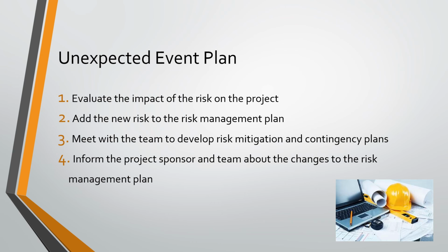In the case of an unexpected event, we would evaluate the impact of the risk on the project. We would add the new risk to the risk management plan. We would meet with the team to develop risk mitigation and contingency plans, and then we would inform the project sponsor and team about the changes to the risk management plan.